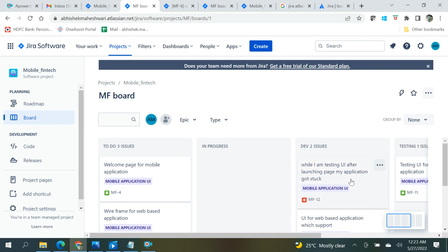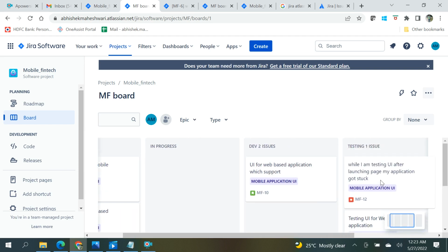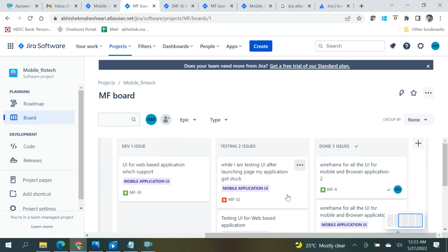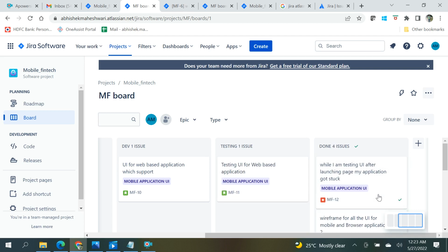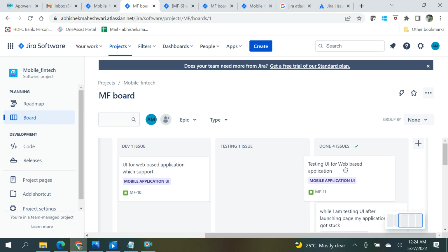Once he feels the defects are fixed and the test cases and regression testing have passed, he can move it to testing, and the tester has to test it again. Then it goes into done. Once this is done, I can move the story into testing, and the tester makes it done, so the story also becomes completed. That is how the Kanban board flow works.